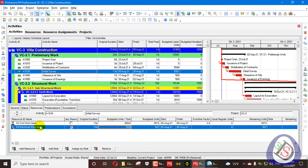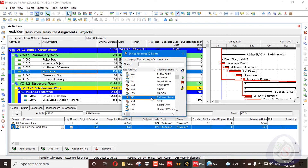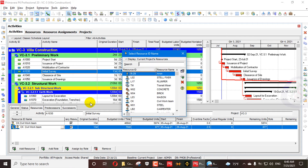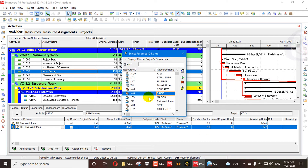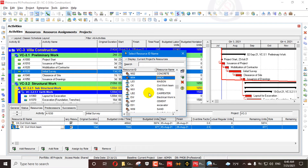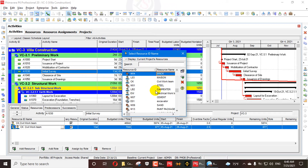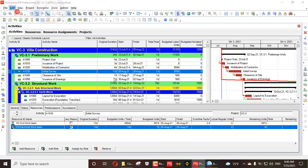For example, if I change the value to 50, it will not matter — it will change to the default. If we change it to 70 and change the hour time factor, note that the hour time factor is not commonly considered in construction project management. Other companies use it for procurement or other purposes. So when we change to Electrical Work, it changes the weighted unit accordingly.